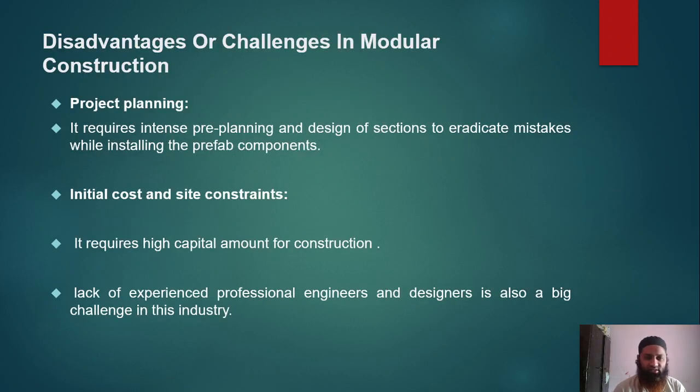Disadvantages, challenges in modular construction: project planning. It requires intense pre-planning and design of sections to eradicate mistakes while installing the prefab components. So here, intense pre-planning is needed because a small mistake might increase the cost of construction, because a small mistake in the design of elements can't be rectified later on. After it has been casted and prefabricated, it can't be rectified afterward. So this project pre-planning is very important here.